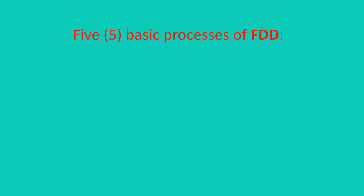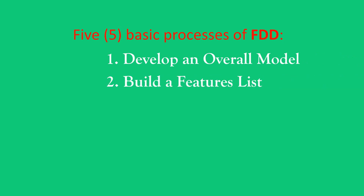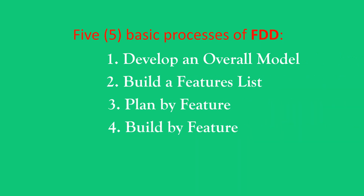FDD was designed to follow a five-step development process built around discrete feature projects. That cycle looks like this: develop an overall model, build a feature list, plan by feature, design by feature, and build by feature.